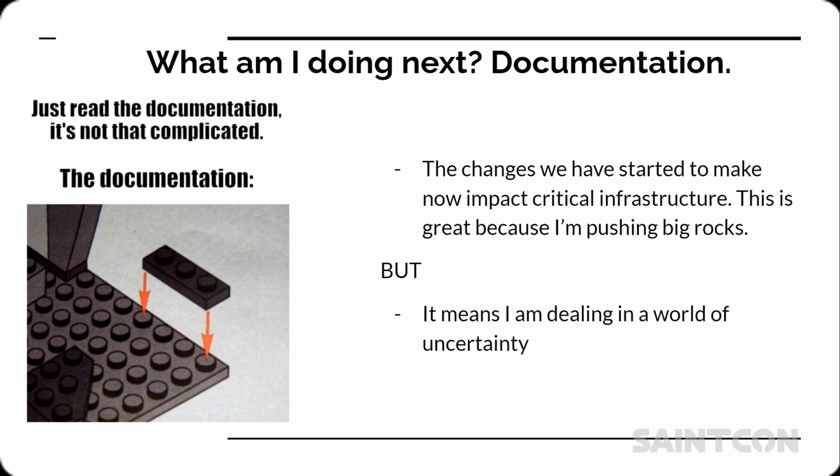I had one company I worked for, they tied it into change management. So anytime we wanted to change a firewall rule or make a major change, we had to submit a change management ticket into the ticketing software. It then got reviewed by other IT staff. Is this really a good idea? Is this the route we want to go with this? And we had to have a detailed plan in there in the change management of exactly what we were changing. And if we had to back it out, what was our back out plan? And so it was all documented through the ticketing software, so it was all centralized in that database. Okay.